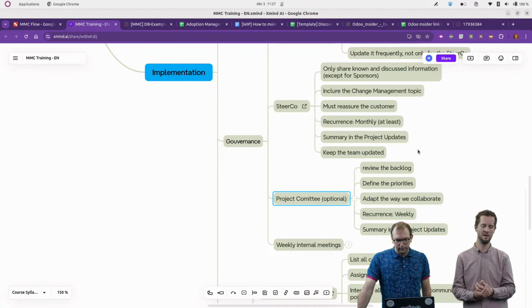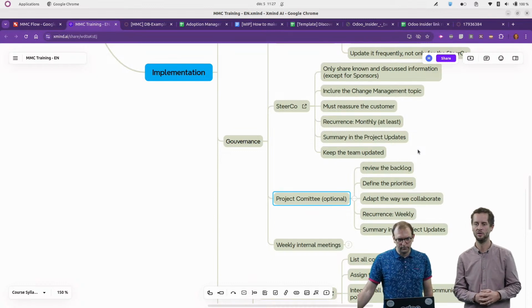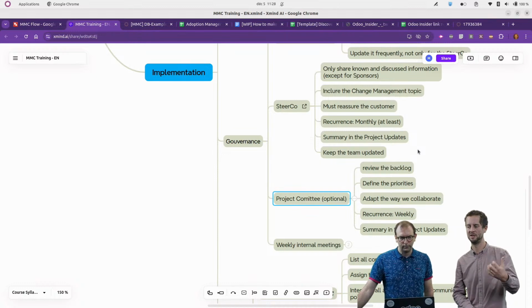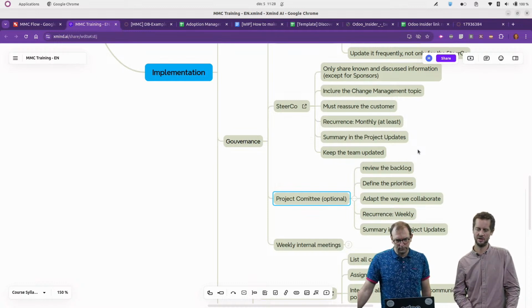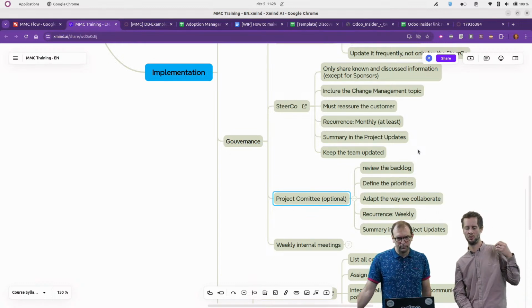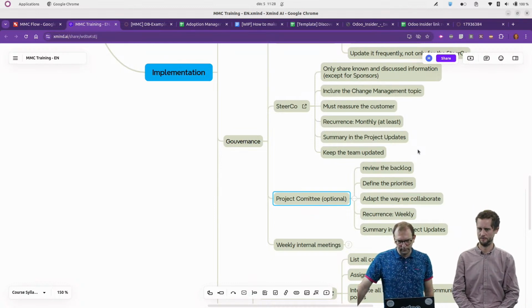So to be able to really think and put some justification, as Max said, behind those numbers, and to be able to explain the number, to be able to defend or to present the entire budget to the client by really knowing what's behind the number. In the past we had all those formulas. It was hard for the client to understand and hard for us sometimes to explain why we had these estimates. So by removing all of this and by reviewing our way and our tooling, it will help us to take some step back and see what would be the best to provide the most accurate budget and planning and scoping as well as possible.